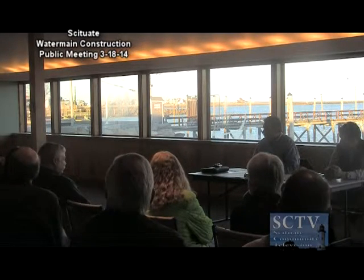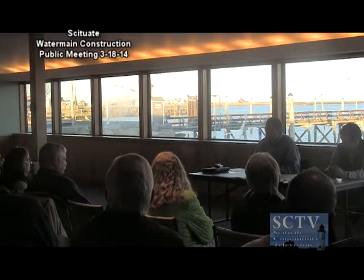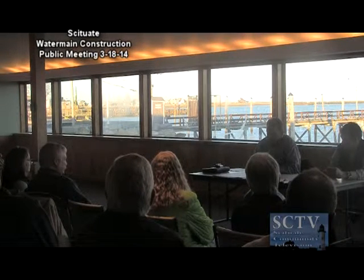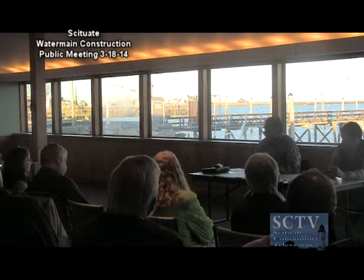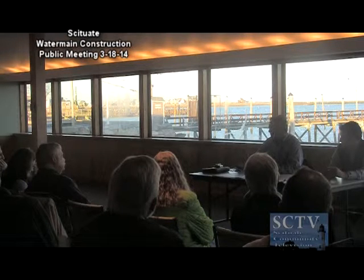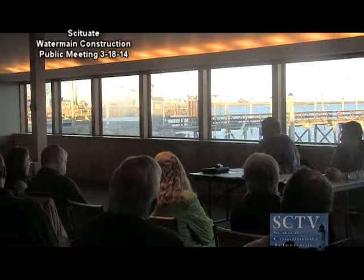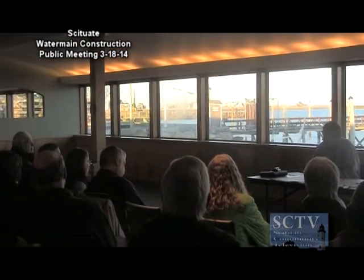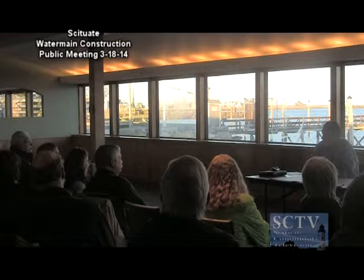If all goes according to plan, how long will it be on the plastic temporary at Lighthouse? Our plan was, I think we estimated about 8 weeks for that whole project, lock, stock, and barrel. But it all depends on how well it goes. They may hit rock, they may have water problems out there, it could be a lot. So I say 8 weeks tentatively. When you make the connection, do you get on your side of the meter or my side? I think you luck out. I think you're on our side of the meter, so you're coming in through a hose tap or something. Yep.